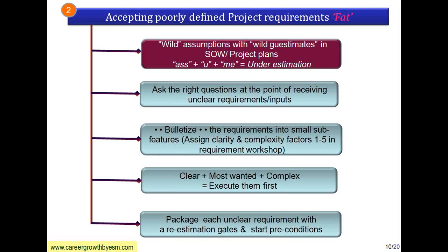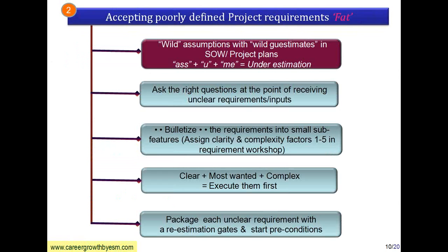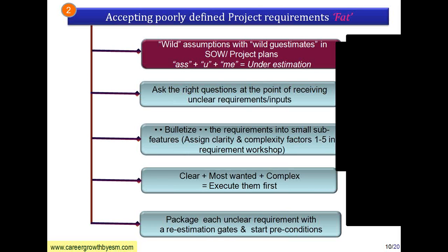The next type of fat is handling poorly defined project requirements. To win projects, pre-sales teams often make wild assumptions due to heavy competition, but once the project is won, those assumptions are no longer valid. Wild assumptions lead to underestimation, which leads to shortcuts, which leads to quality issues, rework, increased cost, and angry senior management — all related to project fat.